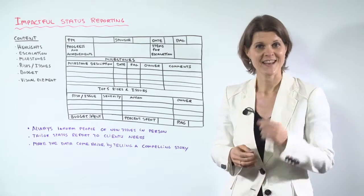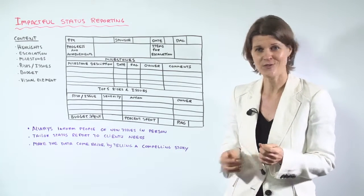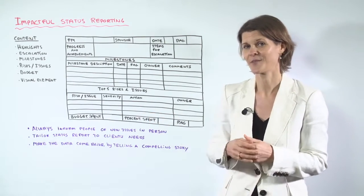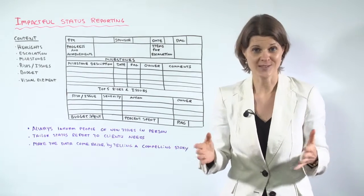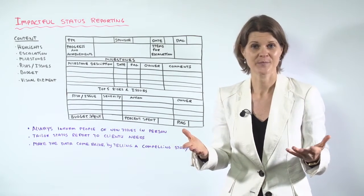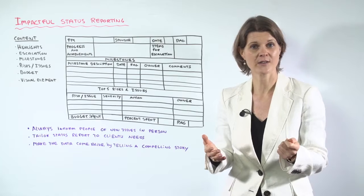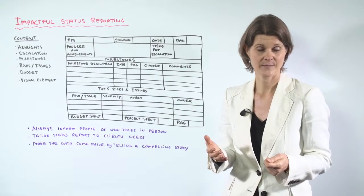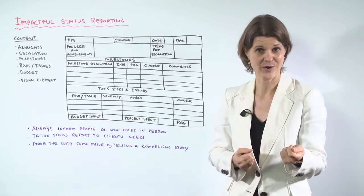Now a word of caution. Never raise a new risk or issue in this report for the first time. No one likes bad surprises when they open up that report. Always call a stakeholder first or see them face to face. In that way you can explain what's really going on.